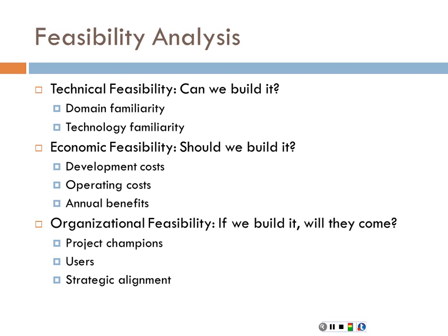But in addition, you have these operating costs, right? These are the much longer-term things. Like how much is it going to cost to maintain this? Or if it's a hosted service, what are the monthly costs? The client is going to have to pay monthly for actually maintaining their account. Then you also want to document what some of the benefits are monetarily, be it how much they're going to realize in savings or increased revenues.